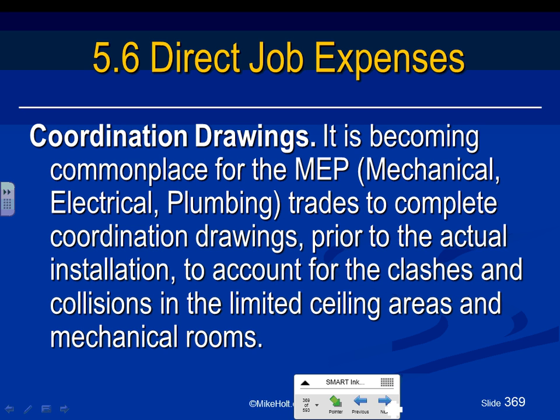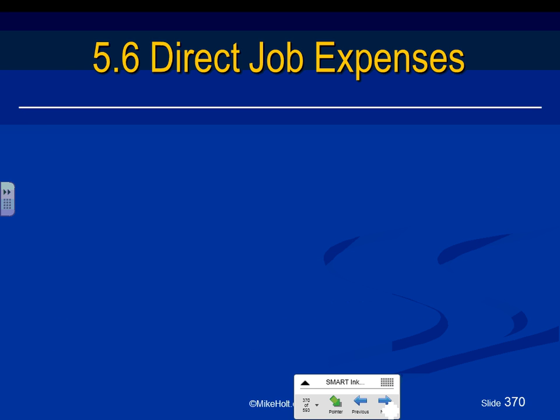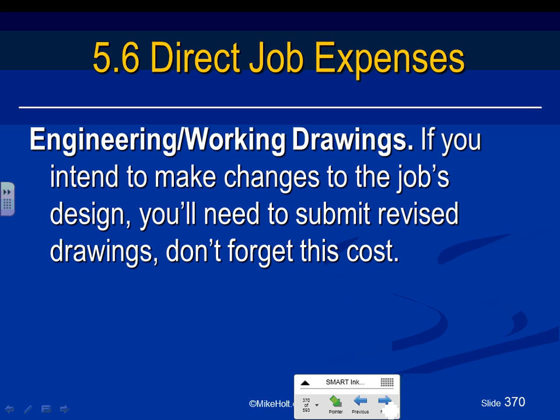How are you going to recoup this money? This is coordination between all the disciplines before you build the system. So you're going to have a BIM coordinator in your company doing all this work. You're going to assign their time and dollars to the project. So coordination of drawings is very, very important.